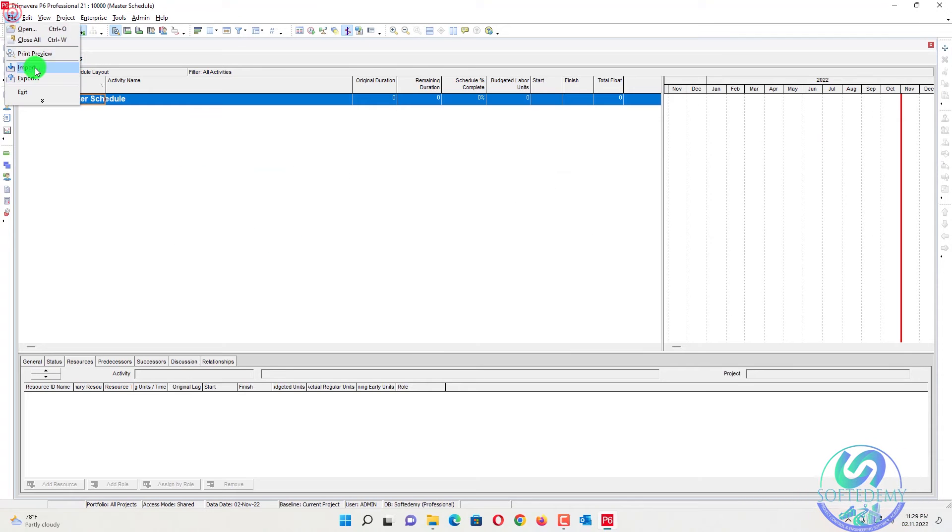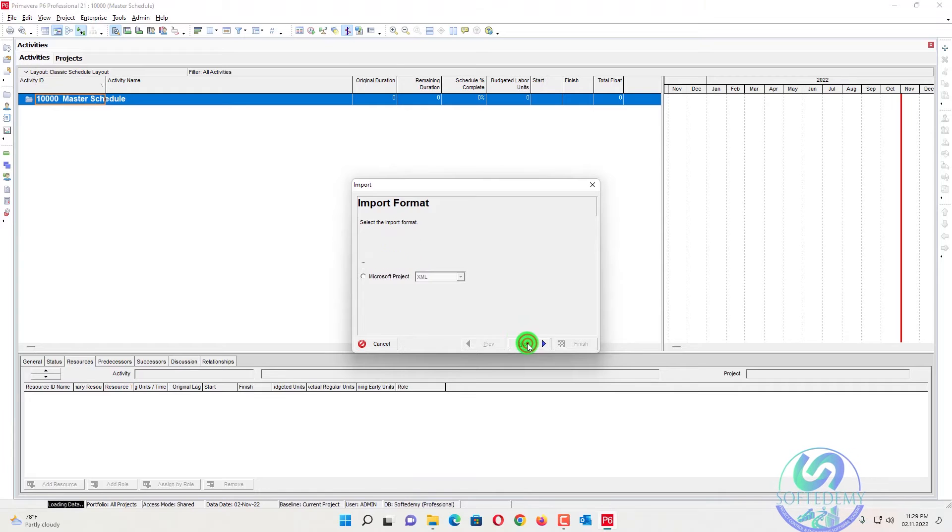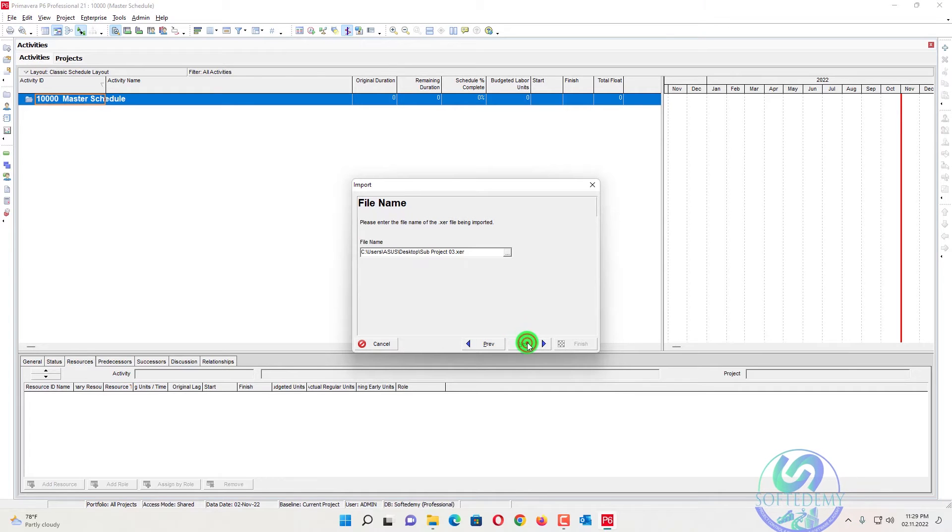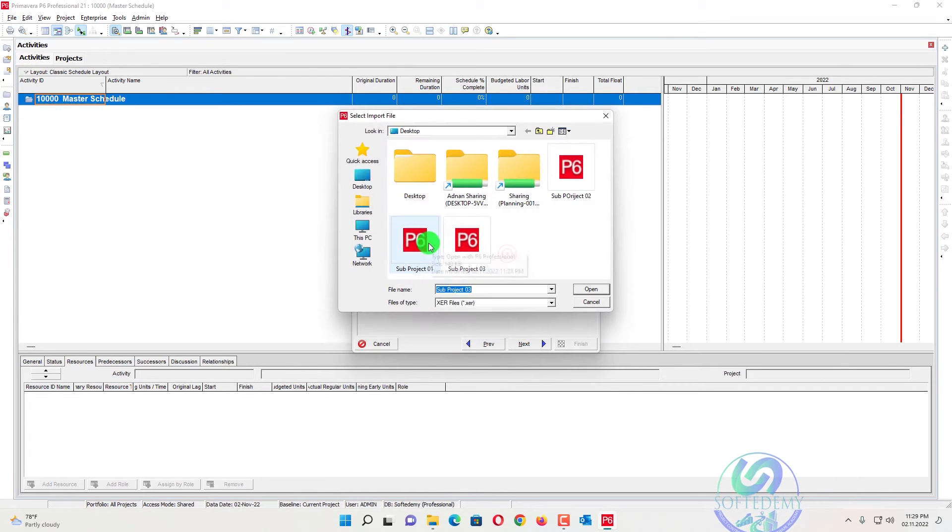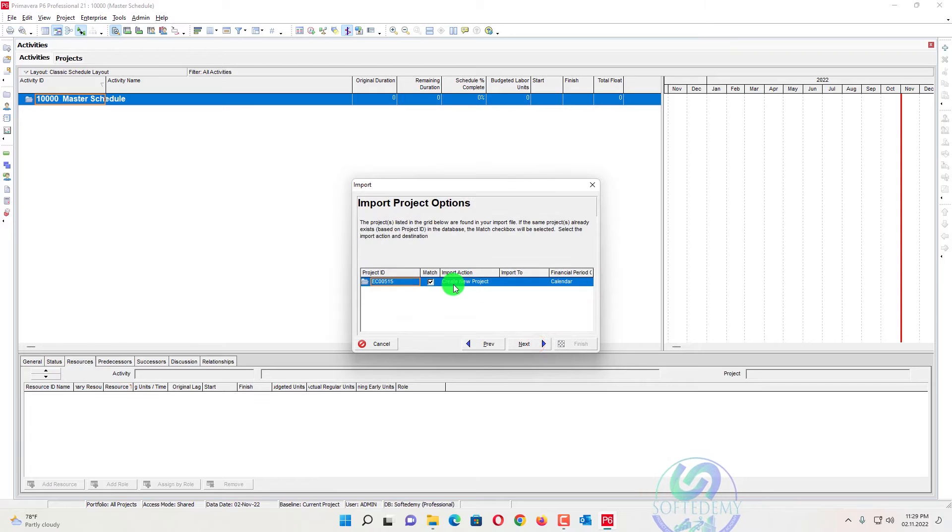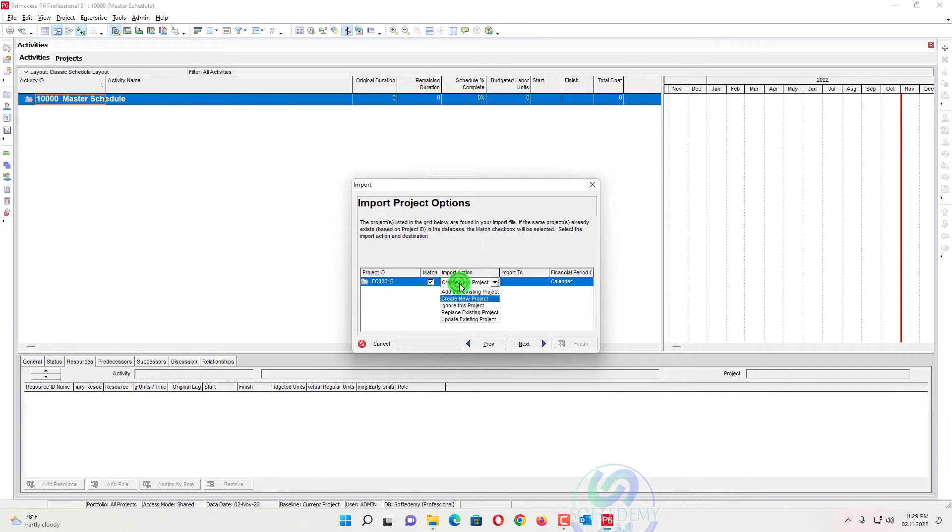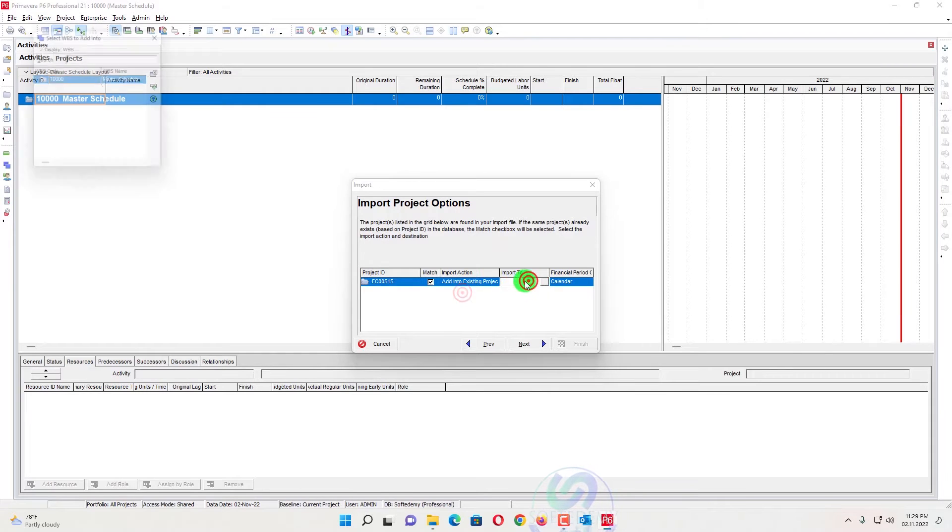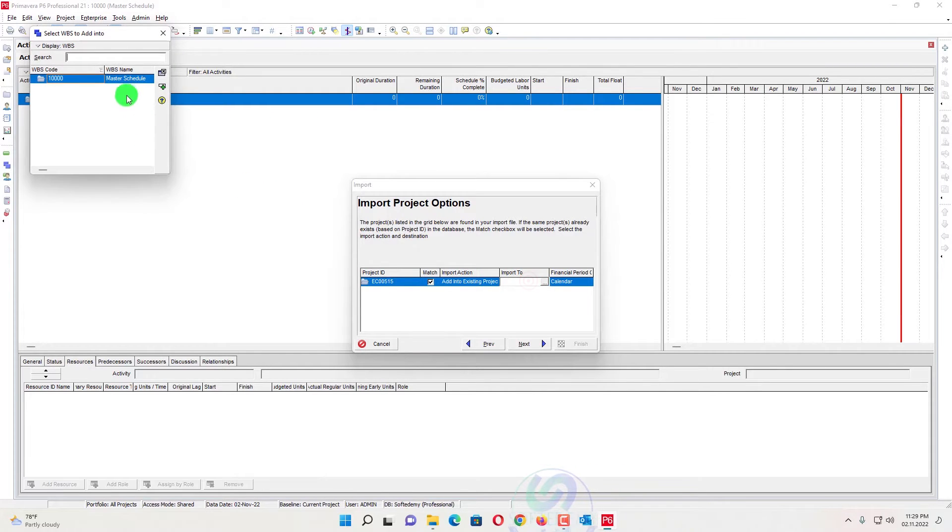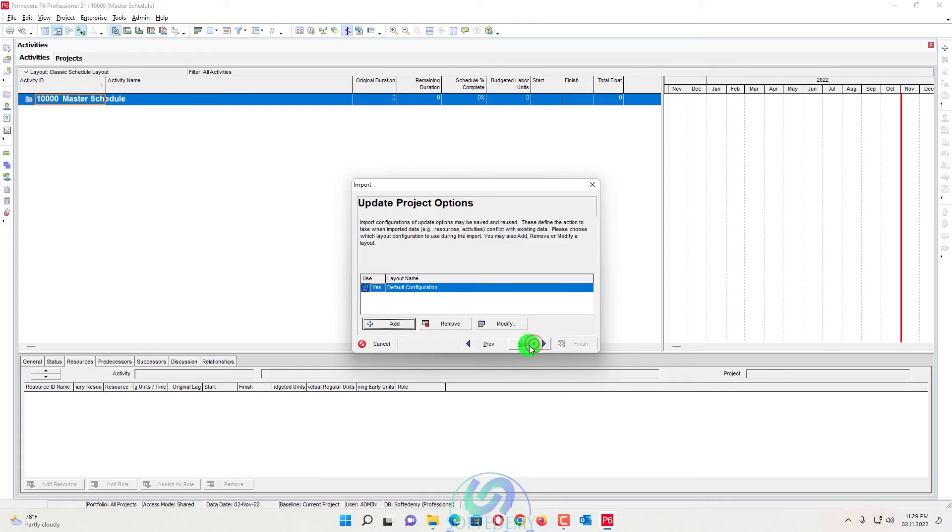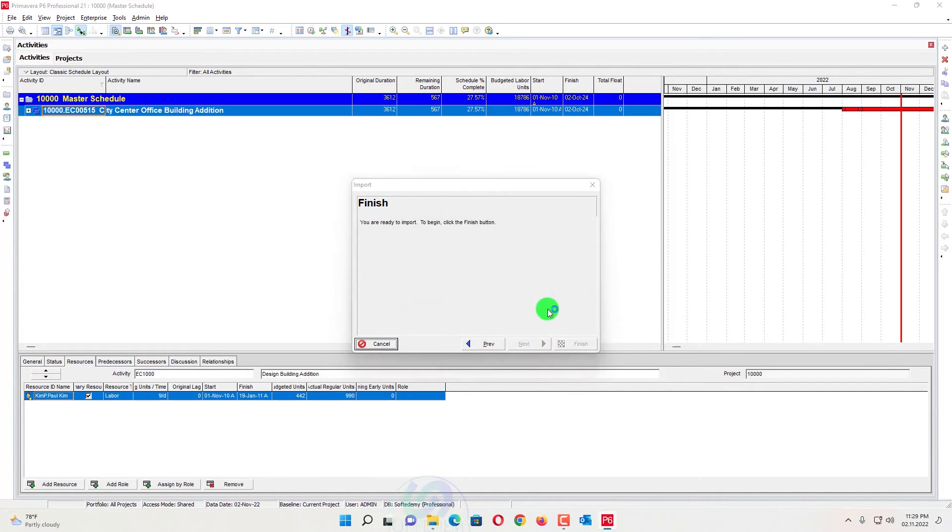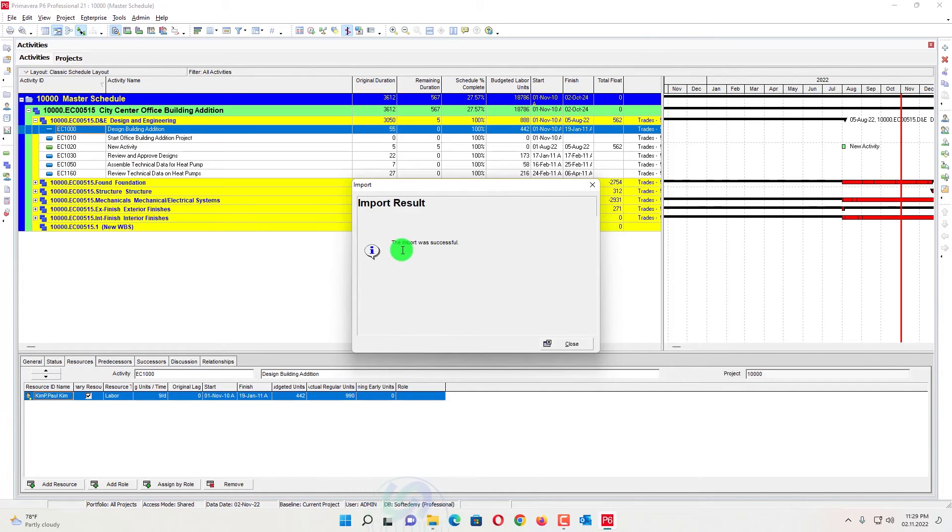Now file, import that one, XER project. I will select the first project here. Open, next. Here it will ask, do you want to create a new project? I will say that I want to add into existing, which one is master schedule. I will select that one. Next, next, finish. Now it will add my all data into master schedule.